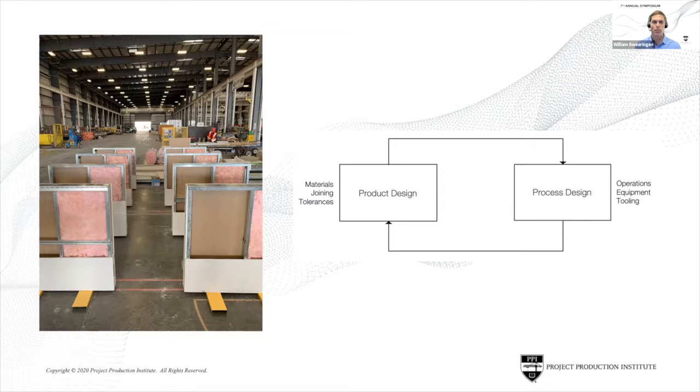And so we mocked up 8 different versions of it using double drywall, single drywall, specialized metal studs that's going through R&D right now. So it was our ability to say, here are 8 different variations, establish a cost for both labor and material, and also a level of risk and complexity along with each one of these. So as we feed this design to our production system, we understand the overall cost. We also understand the variability as it's plugged in when we start mass production.